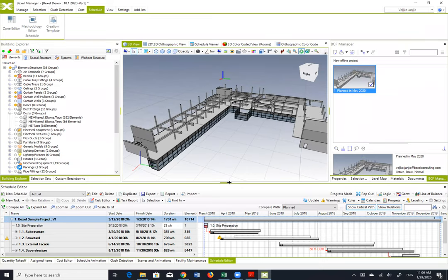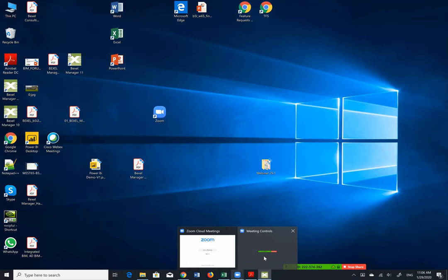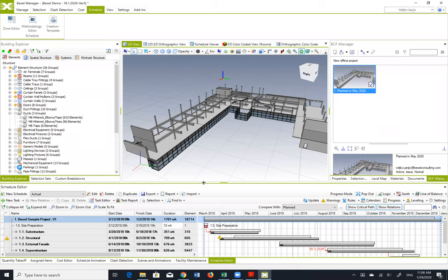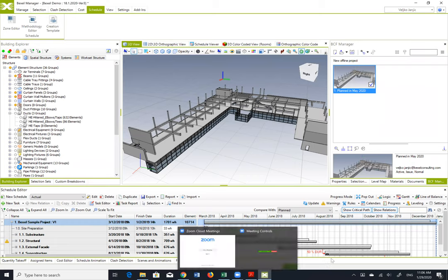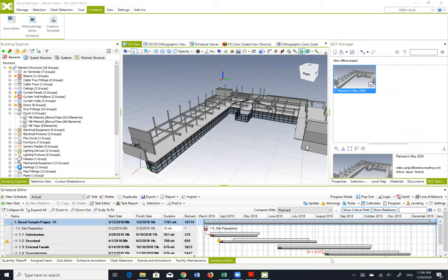automated scheduling is not just important for the initial schedule, it's even much more important for every change. So whenever you add new elements or new groups of activities and so on, or change, let's say, add lighting fixtures, change the walls and so on, the system will automatically create an updated version. I think there was one webinar when one of my colleagues presented this use case earlier. Are there any other questions?